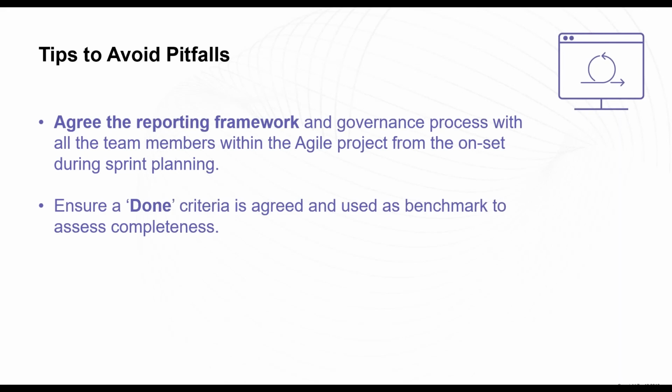The done criteria essentially explains, as a project, everything which needs to be completed within a user story to class it as being done. So that's going to include things like making sure that your user stories are defined, that dev is being completed, that unit testing is being conducted, release notes have been shared, any training documentation has been uploaded to a wiki page, obviously that testing has been completed, and that there's no sort of critical or high defects preventing that story from being closed.